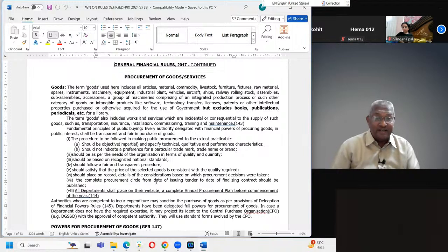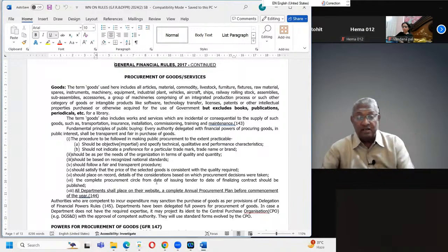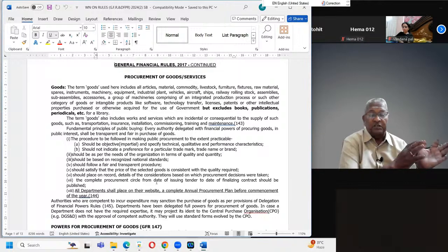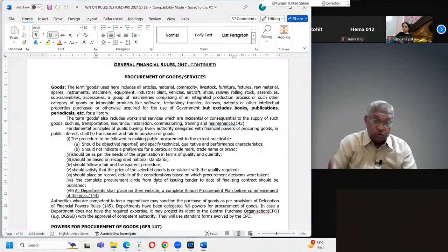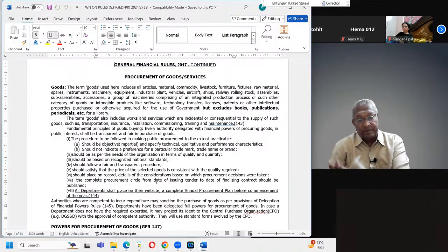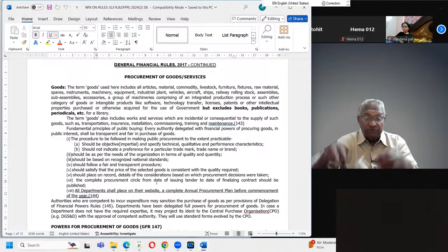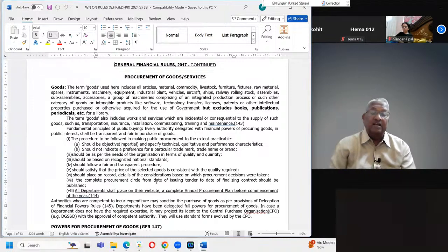हम एक मशीनरी खरीदते हैं, that is goods, we are purchasing that. उसको इंस्टॉल करते हैं, ट्रांसपोर्ट कराते हैं. Some may do it free on board. इसका मतलब हम नॉर्वे से कुछ इक्विपमेंट खरीदते हैं, नॉर्वे के लोग उसको उठाकर शिप में रख देंगे, उतना तक उनकी रिस्पॉन्सिबिलिटी है. शिप में रखने के बाद ट्रांसपोर्टेशन, that is my responsibility. इंश्योरेंस, that is my responsibility. Then it will come back, delivered in the port. I have to take delivery, transport the same, bring it to my industry or my office, get it fixed. All these things also will be included in the procurement.